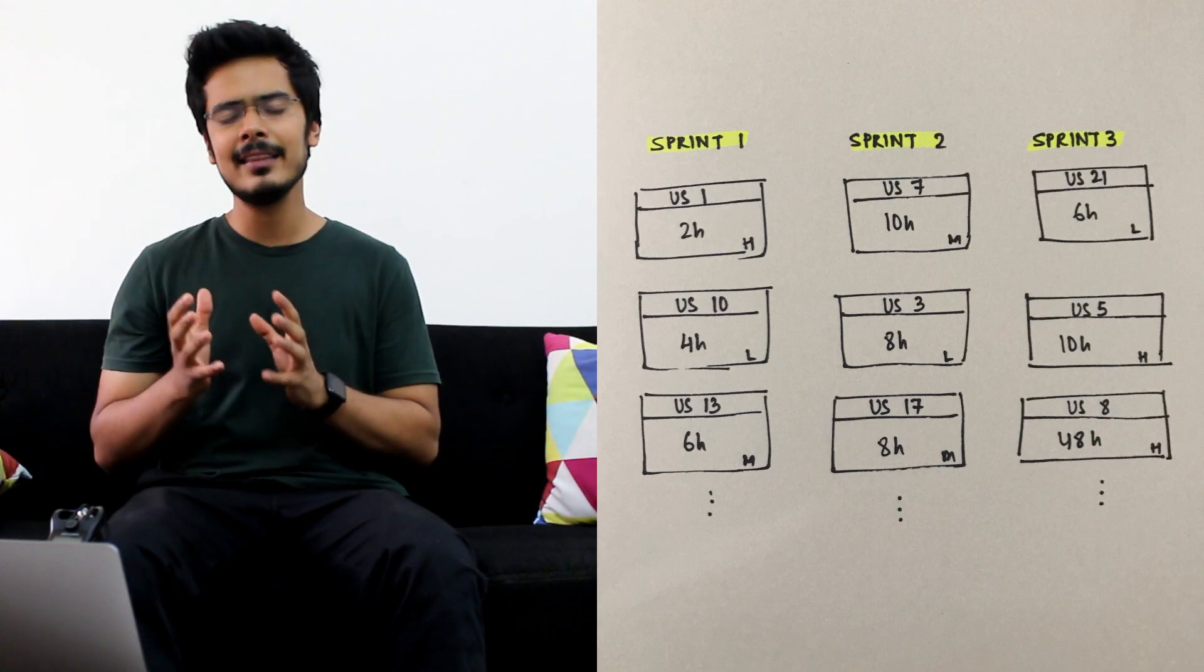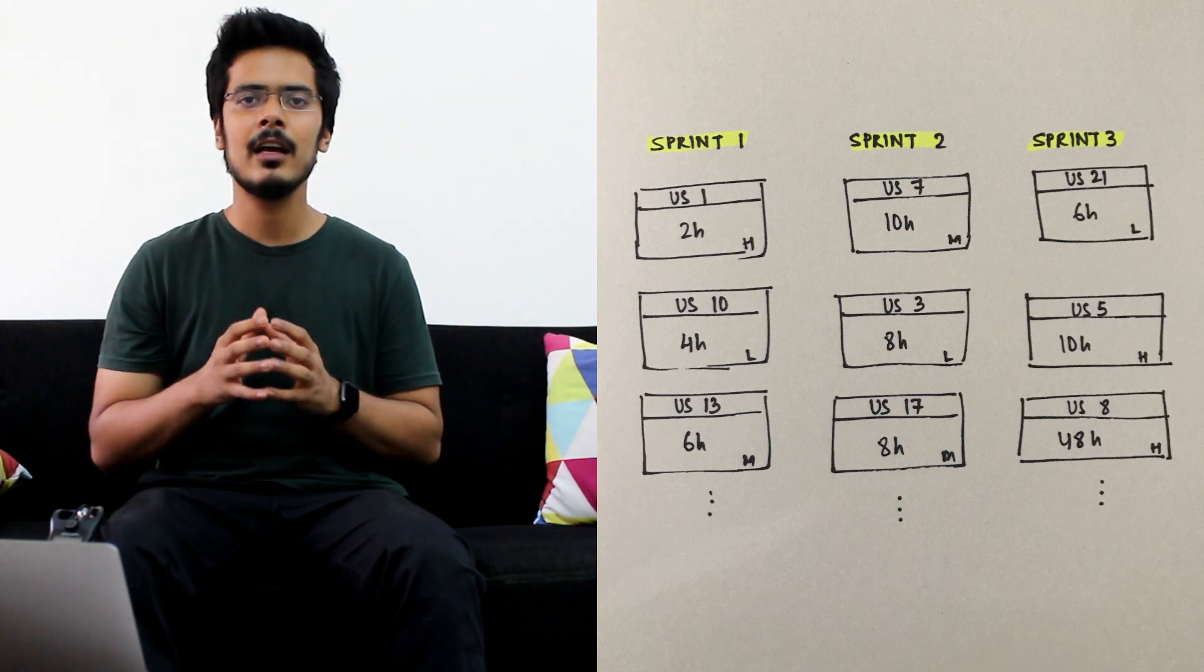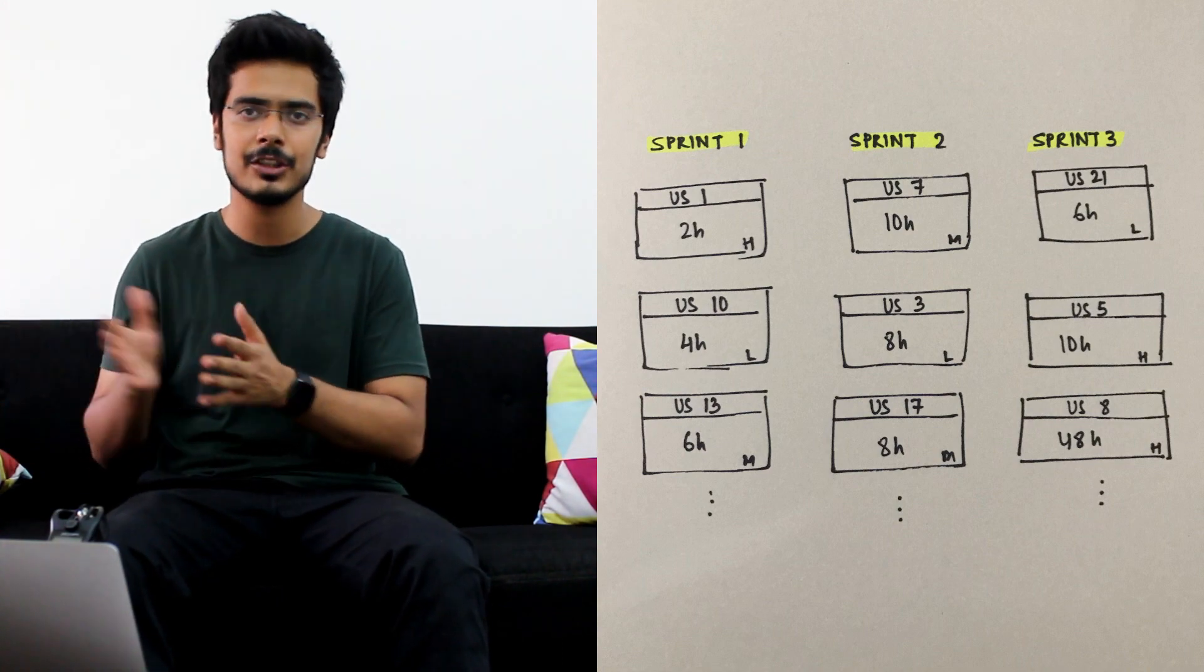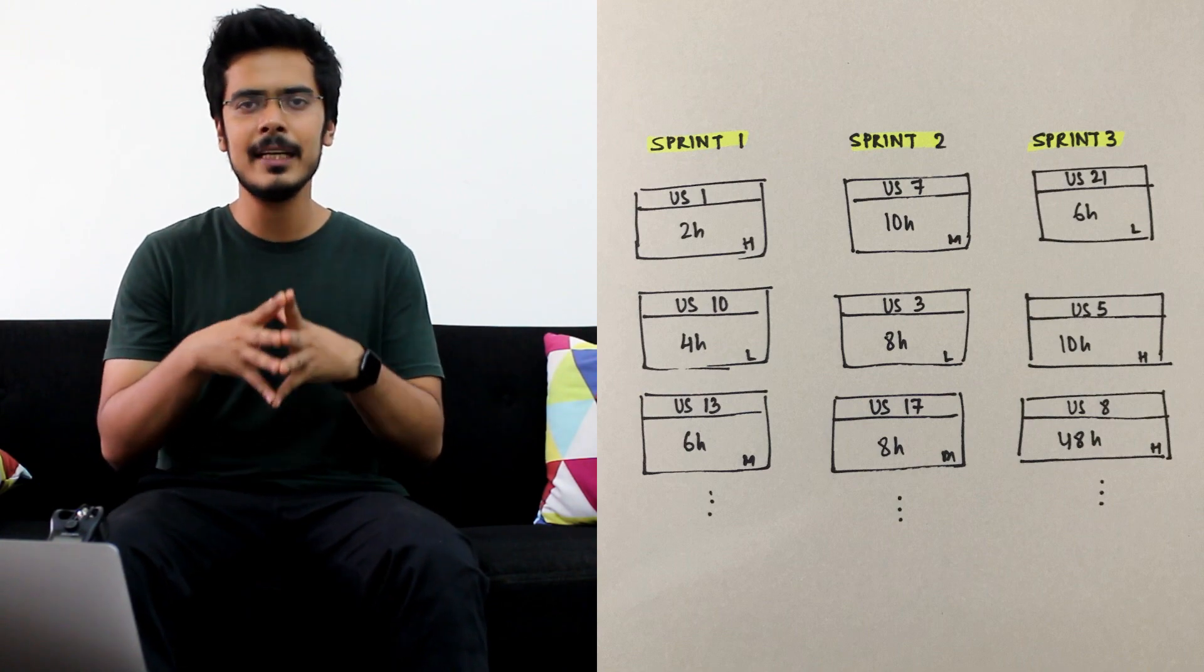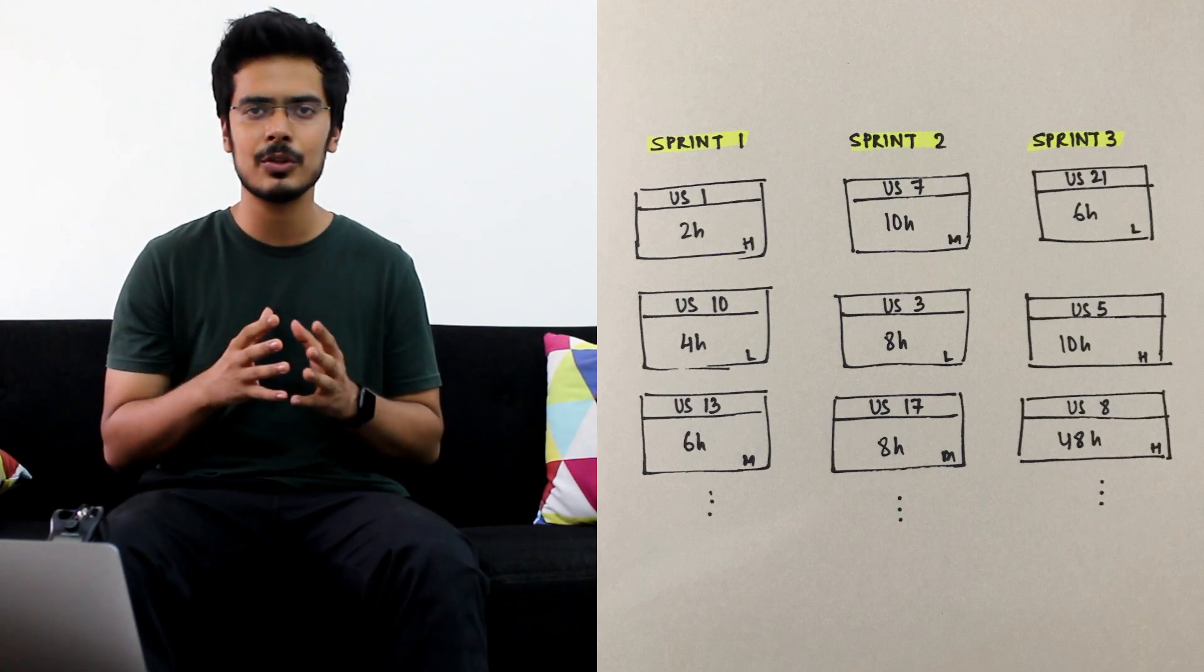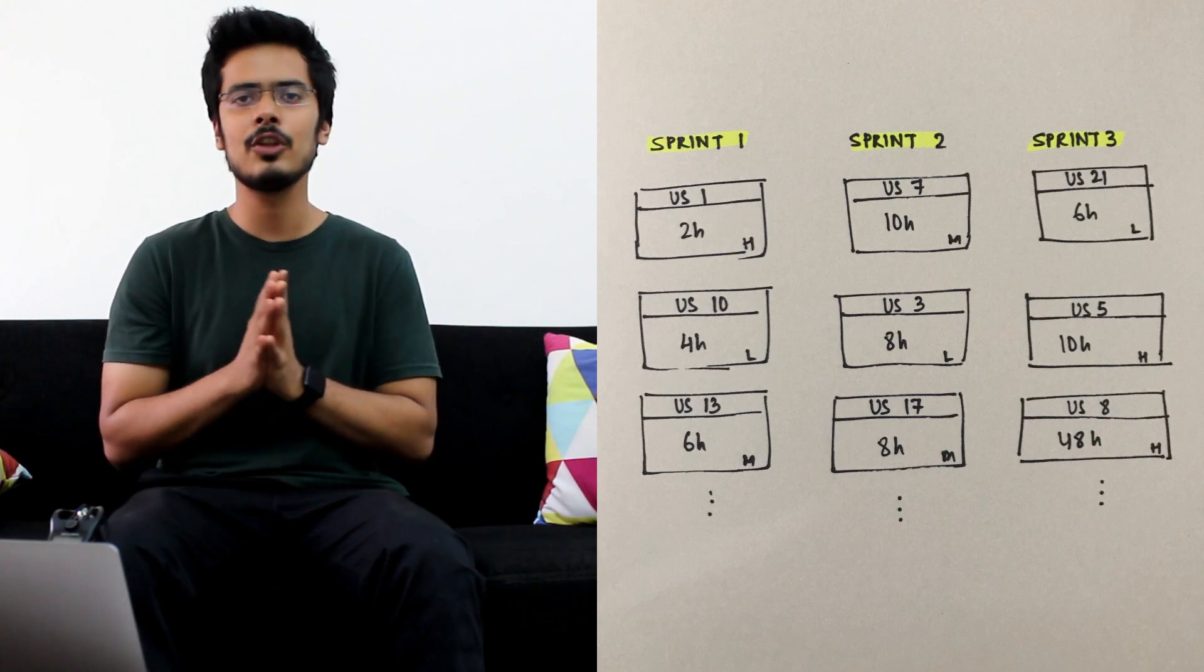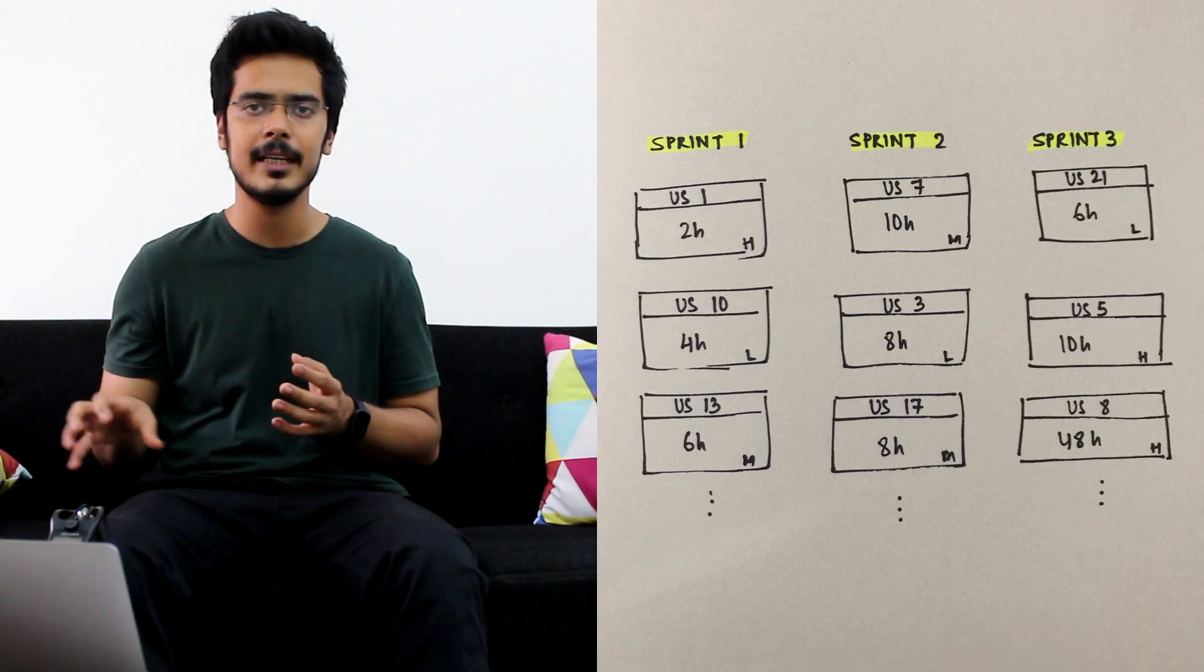Your release cycles define the length of your sprint cycles. So if you have shorter release cycles you will have shorter sprint durations. At the end of the sprint, if your team is not able to complete all the user stories which is a cause for concern, it tells you that your project is not on schedule and something needs to be done.